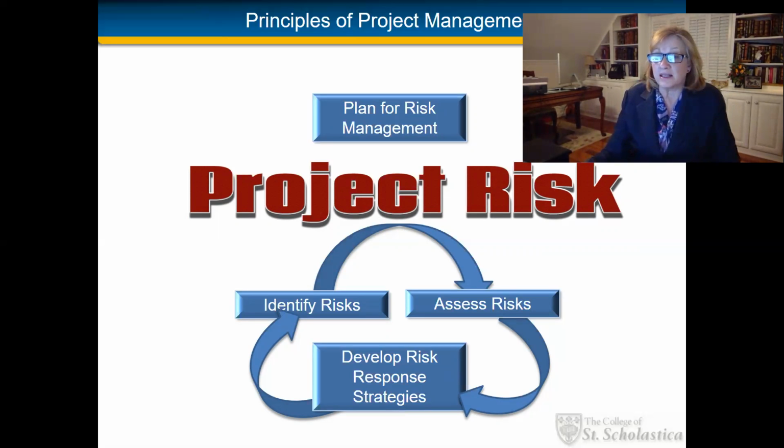We start out by assessing risks using qualitative tools and techniques, and then, if necessary, we move on to quantitative risk analysis or risk assessment. Not every risk will require this level of analysis. The project usually determines this. The output of the risk identification and assessment process is the beginning of the risk register, which includes a list of risks that have been assessed and prioritized for managing.